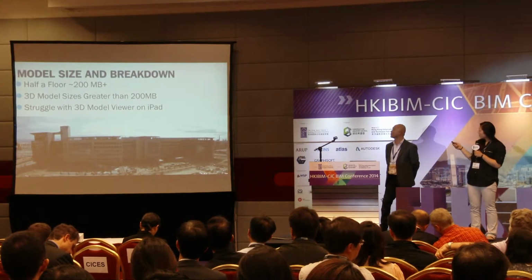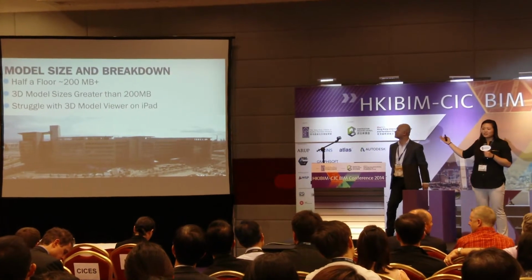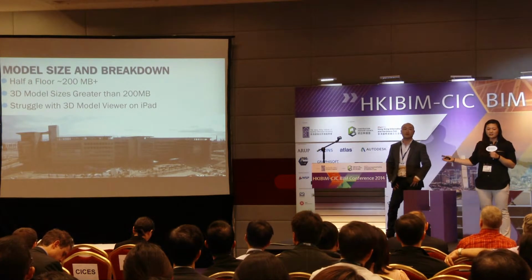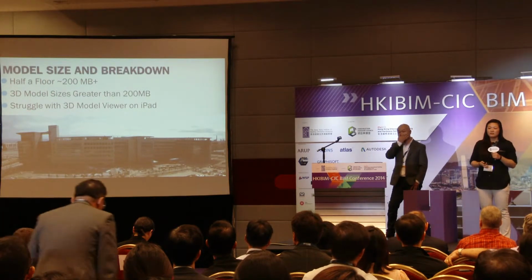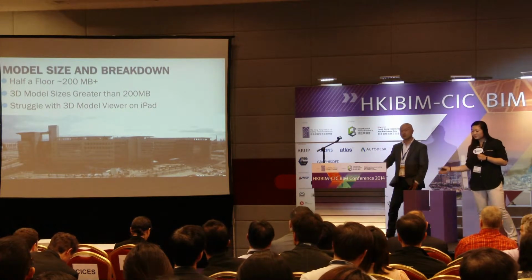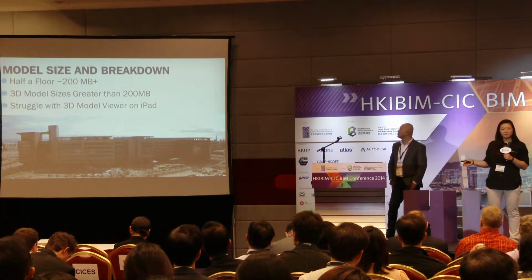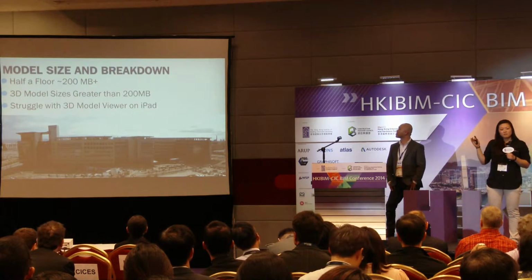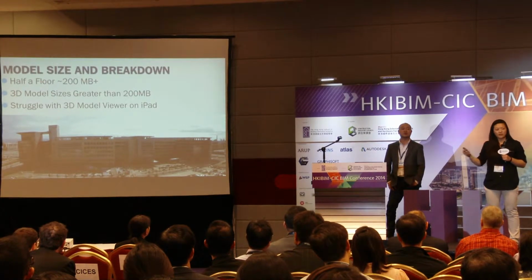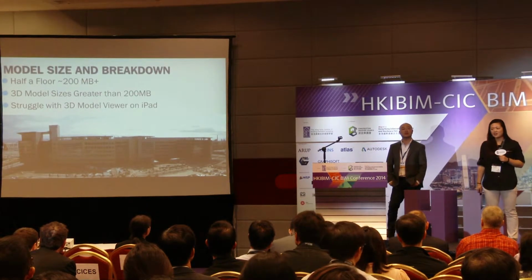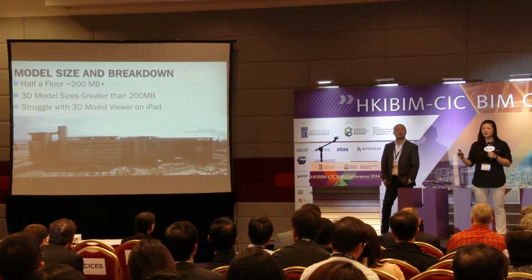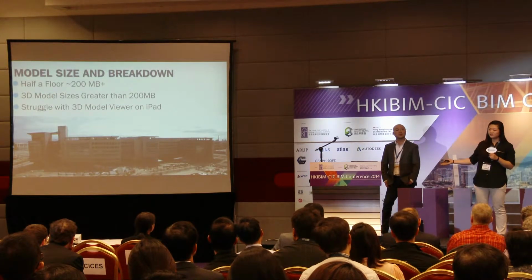Over the many years of construction, we actually struggled a lot with having a 3D model viewer on the iPad. With this highly detailed model, what are you going to do if you don't use it for construction? Traditionally, for the use of BIM in America, BIM MEP coordination was more of a pre-construction tool for clash coordination and MEP coordination. But what we did here is we're bringing that model into construction, keeping it as built, and then handing it over to the facilities management team.